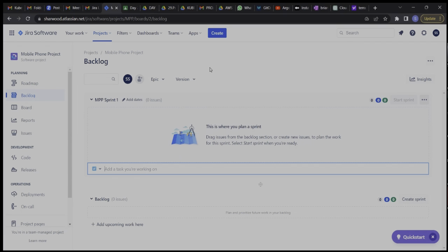Okay, so on my Android phone, I wanted a big topic, because remember, when we break the epic to features, we have to further break the features to user stories, right? So on my phone, when I go to settings, I see connections. Connection now will be a feature. But a feature is still very big. That needs to be further broken down. That is why the feature connection was further broken down to Wi-Fi, Bluetooth, airplane mode. So those are user stories under the feature connections. Do we understand now?